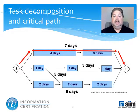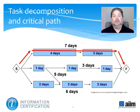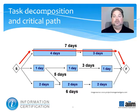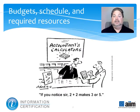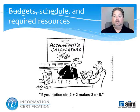Next, the identified tasks are decomposed, or broken into smaller tasks grouped by logical dependencies, in order to determine which can be done in parallel and which are those whose completion is required before further progress can be made. Those falling into the latter category are said to be on the project's critical path, and generally are given priority when their time comes in order to ensure no bottlenecks arise that can interfere with on-time completion. Now that the tasks have been identified and their priority determined, estimates can be prepared regarding schedules, costs, and resources — technical and human — for each task and overall. The result here is a baseline against which future progress, and possible instances of scope creep, will be measured.